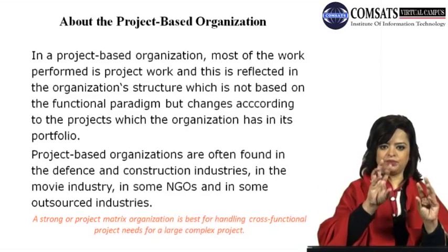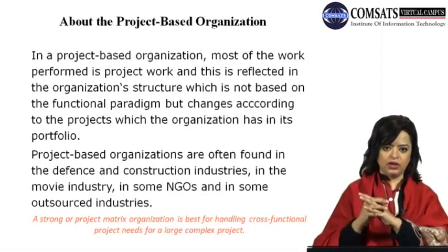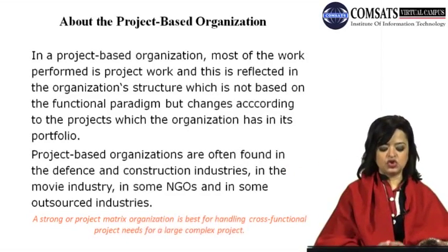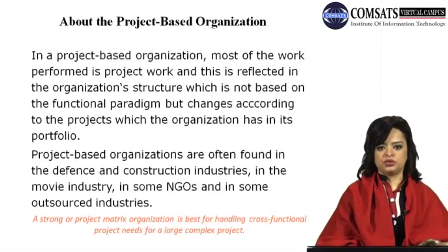Okay? A strong or project matrix organization, again, functional matrix, projectized. So the project matrix and projectized industry are going hand in hand on that side. A stronger project matrix organization is best for handling cross-functional project needs for a large and complex project. Larger the project is, more complex the project is, you need dedicated resources working on it without any conflicting orders that are given by other managers.